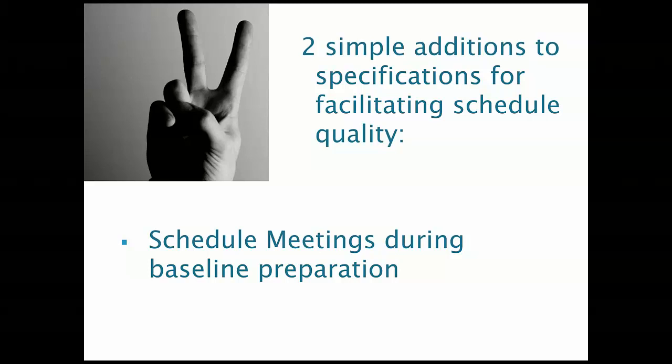In fact, if I'm working with an owner and I'm in the process of rolling out a project with a contractor, that's one of the first things we do, even before the contractor submits the schedule: let's just sit down and start looking at it. That way, once the schedule's submitted, I've already had a chance to look at it. I've already been able to ask questions that I have, identify issues or whatever. So when the schedule gets submitted, it's much easier to approve if I've gone through a good meeting process.